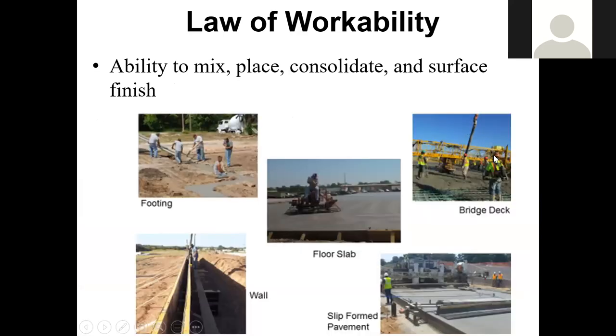That's a good question though. A lot of times you can add water as long as it doesn't surpass your maximum water cement ratio. If you add water and it surpasses that maximum water cement ratio, then if you're a contractor, if you don't meet strengths, that's on you. Tear it out and replace it. And I see that a lot. When the trucks arrive, they test them, and later on when they're going to pour it, they add more water. They can, yeah.